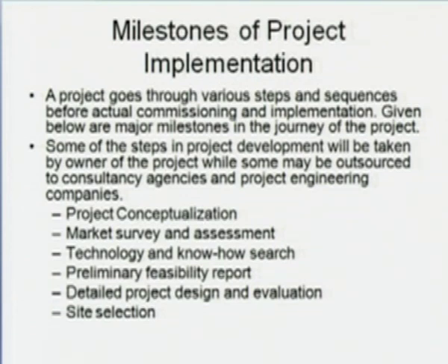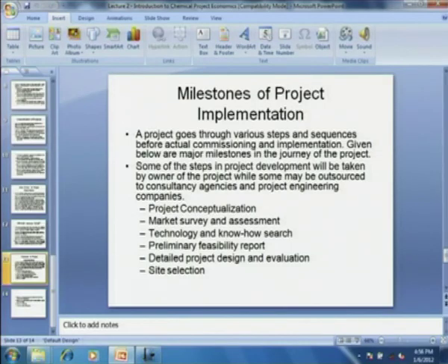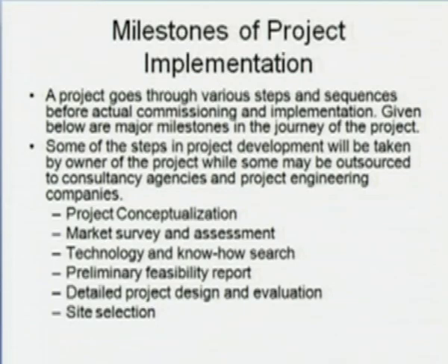A project can be conceived from business and market opportunities, new materials and technologies that are available, consumer feedback, opportunities made available by global politics, or simply out of statutory compulsions such as treating the waste of an existing unit. An example of this category is the government policy of making petrol lead free. Instead of tetraethyl lead, the manufacture of ethyl tertiary butyl ether (ETBE) started as the octane booster in petrol. That could be the seed for project conception, such kind of policies.